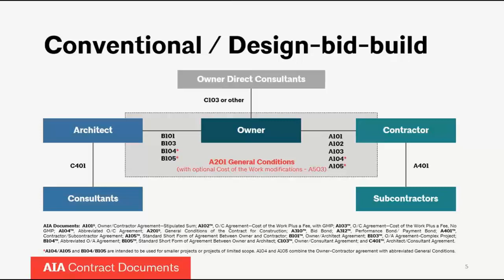You'll hear us refer to that later as the pre-construction phase. It's a pretty linear process, and everything happens on the design side leading up to the finalization of construction documents. Then the owner either goes out to bid or negotiates a price with a general contractor. The owner engages the general contractor and the general contractor engages subcontractors to build the project. So we have a design phase, the design is complete, and then we go to the construction phase.